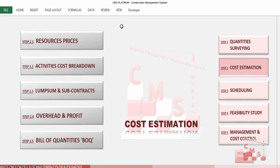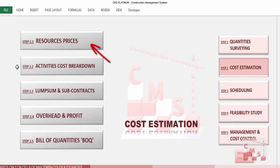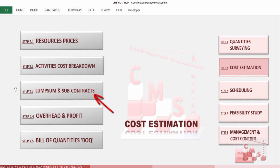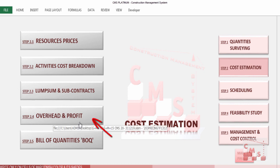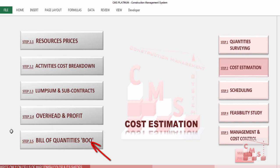CMS directed us to the cost estimation page, which is divided into steps. Step one: insert all resource prices. Then check activity cost breakdown and do required modifications. Then insert lump sum and subcontract work, and check overhead and profit for the project. At the end, CMS will give us the full priced bill of quantity.